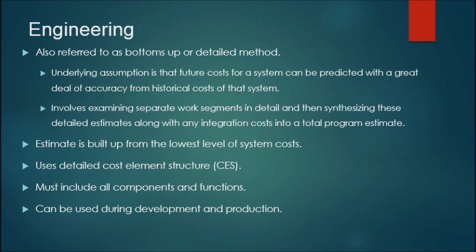Engineering, also referred to as the bottoms-up or detailed method. The estimate is built up from the lowest level of system costs. It uses a detailed cost element structure, CES, and must include all components and functions. It can be used during development and production.